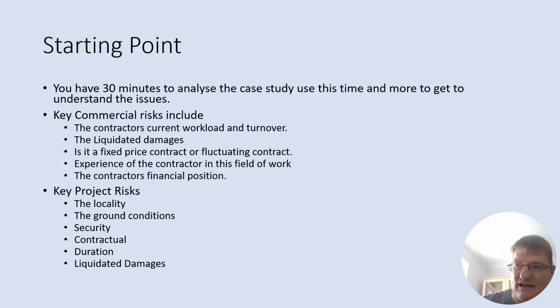The other thing is, and we calculated these a couple of weeks ago, a fluctuating price. Not every contract will have a fluctuating clause in it. There'll be a fixed price. Remember, again, I think I'm going back to about October or November here. Remember I said that in the contract, if it's fixed price, which usually it is, it's usually a fixed price contract. If you've got a contract that's going to take six months, 26 weeks, or 52 weeks, 12 months, then prices may change over the duration of the project.